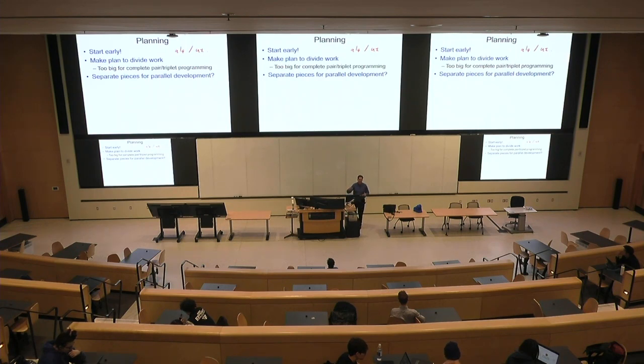And maybe we'll find a few more, make a longer path, and we can just basically set up a vector that stores that, because that is how we encode our path. That's what our algorithm's going to return. Once we do that, the person writing the UI to display a path can just use that. Okay, so they're hooked up to one hard-coded path. After they've shown that one really well, maybe they make another hard-coded path, but you've broken a dependency. So yeah, it's the right way to do it.